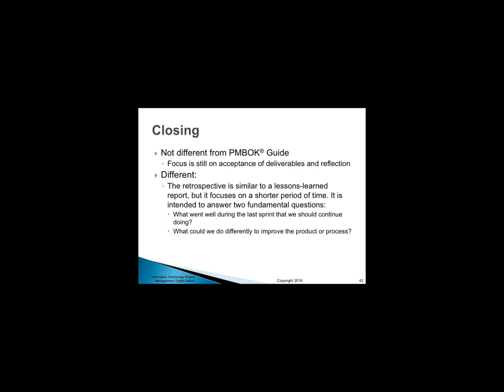Closing. Not different from PMBOK. Focus is still on acceptance of deliverables and reflection. Different. The retrospective is similar to a lessons learned report, but it focuses on a shorter period of time. It is intended to answer 2 fundamental questions. What went well during the last sprint that we should continue doing? What could we do differently to improve the product or process?